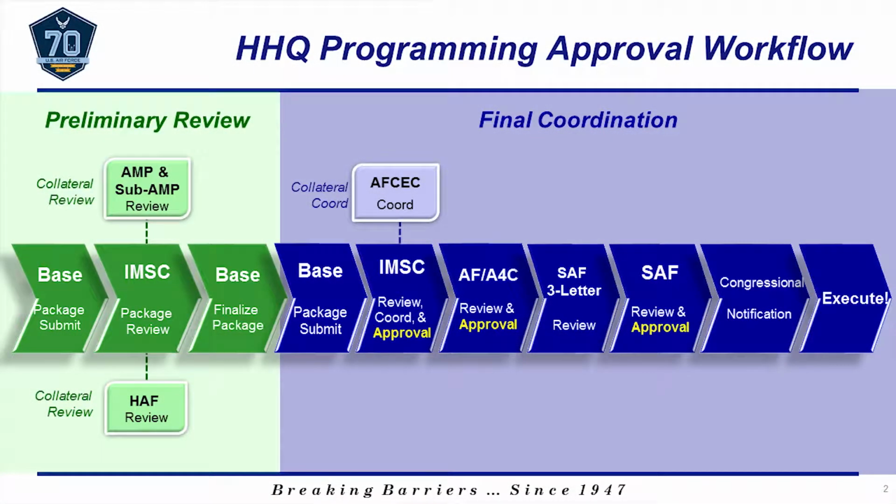The lighter colored box on the left shows a stage called preliminary review. This used to be done by the MAGCOM staff. Under this new structure, this step is primarily between AFIMSC, IZB, and the bases. However, with leadership emphasis on the right solution at the right time, plus proper programming, AFIMSC is involving AFCEC experts. And to save time in final coordination, AFIMSC has also asked air staff to participate during this stage. In effect, AFCEC and Headquarters Air Force are collateral reviewers during the preliminary review stage.